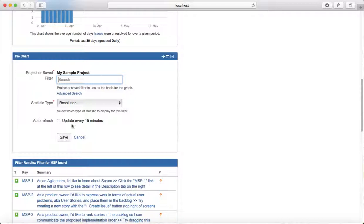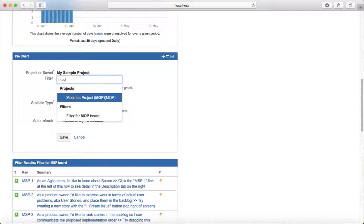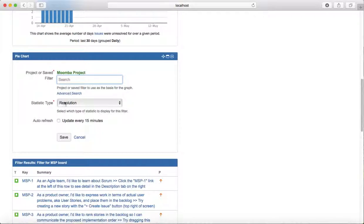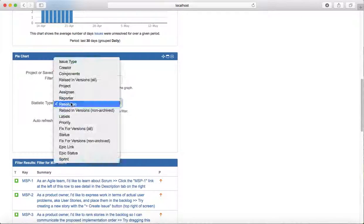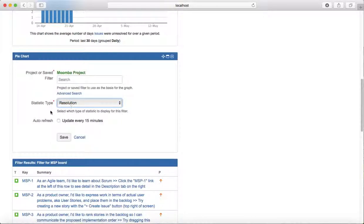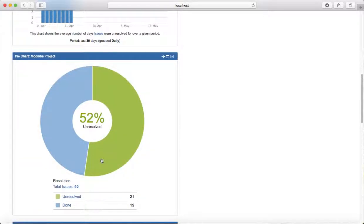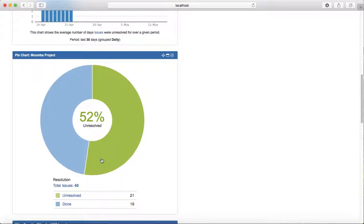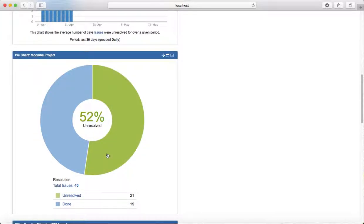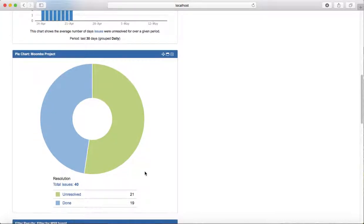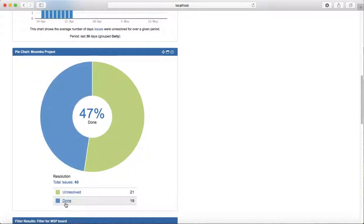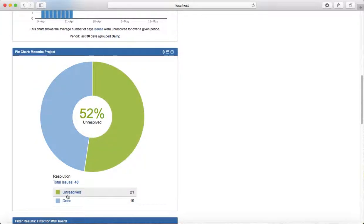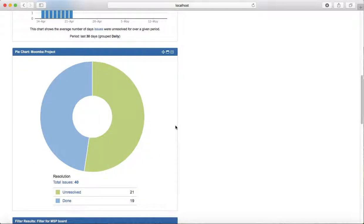Otherwise, I can just select the project - I'll say MSP project - and I'll say resolution statistic type as resolution and save it. It will show me what has been done and what has been unresolved. You can see 19 issues have been done overall in the Moomba project. This is another way to see what has been done in a particular project.